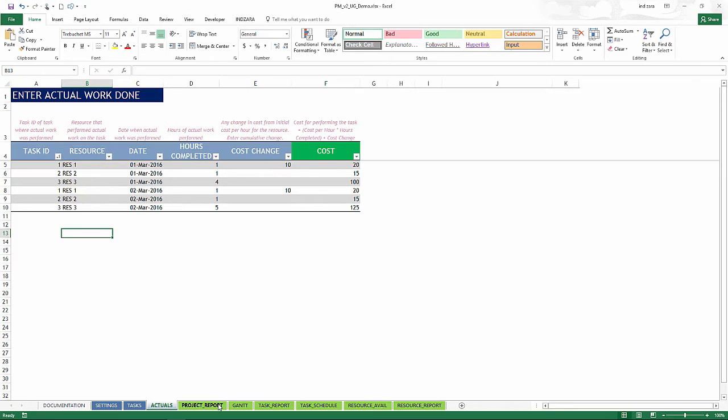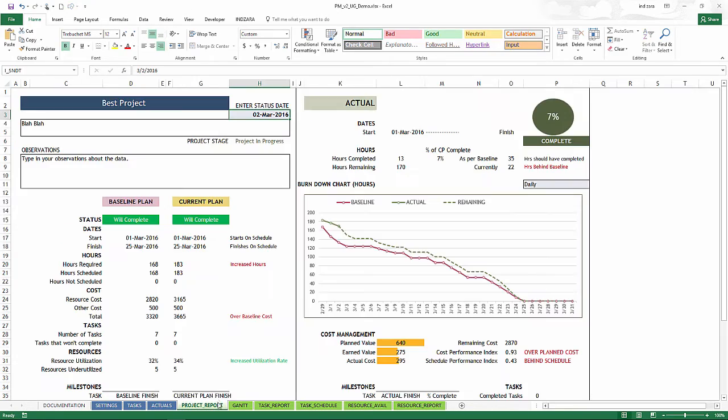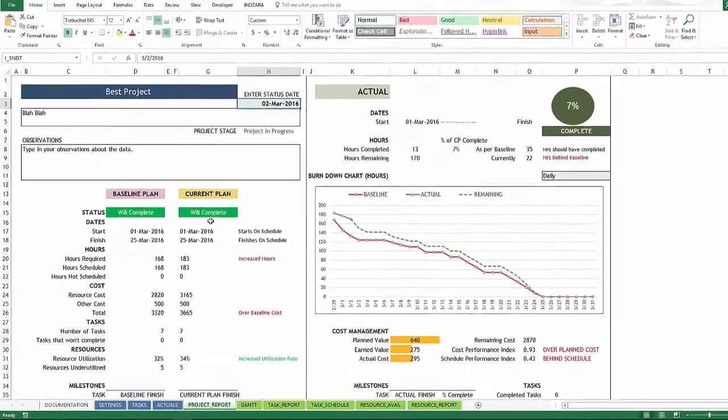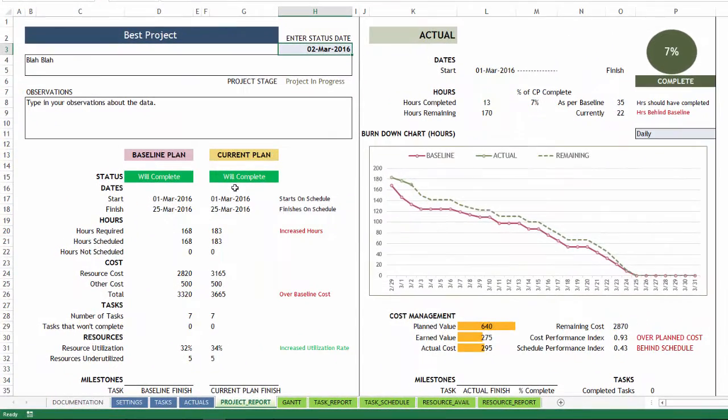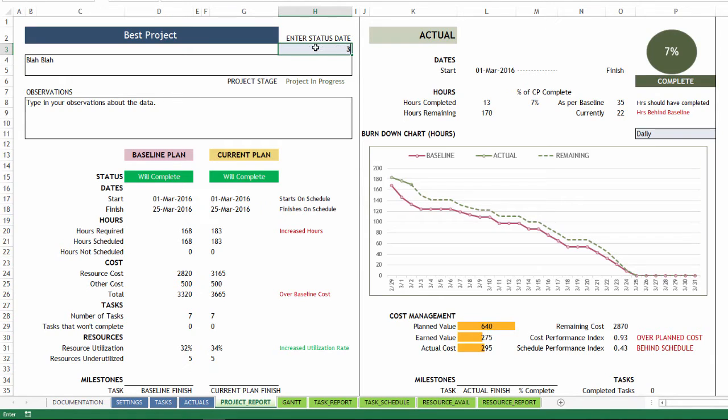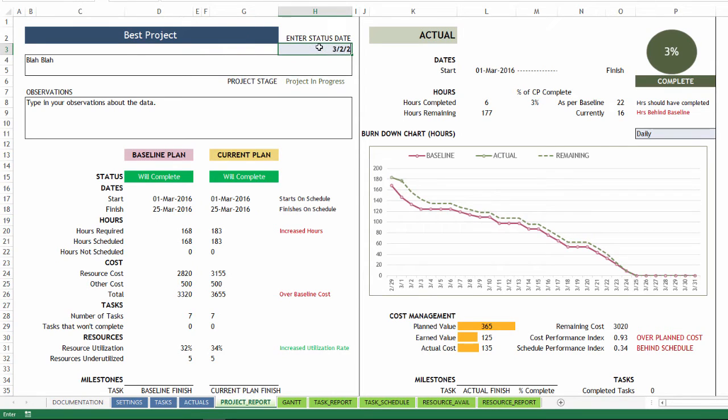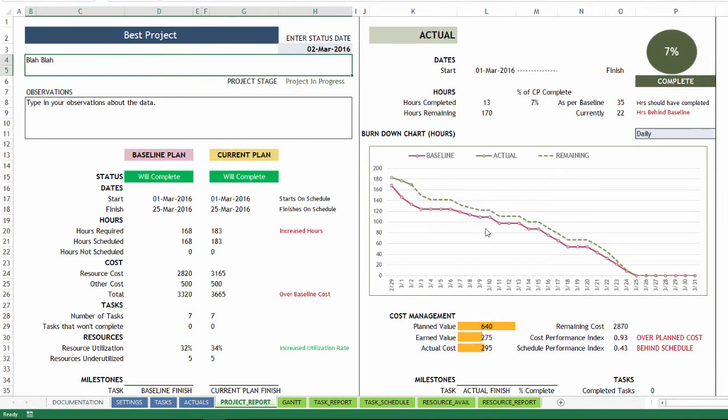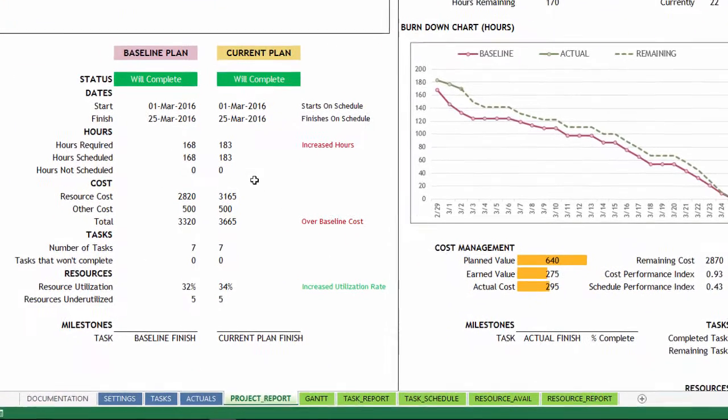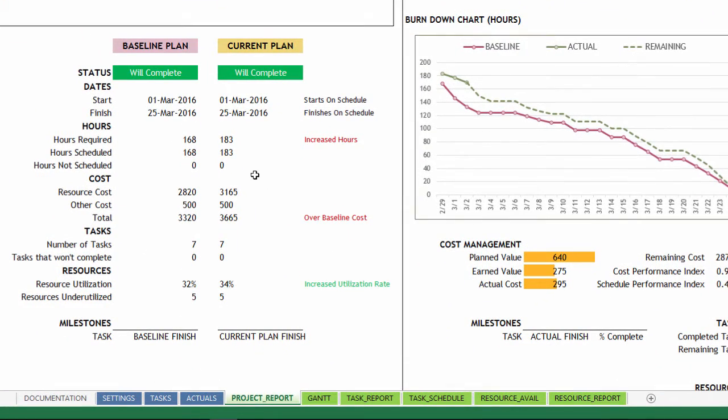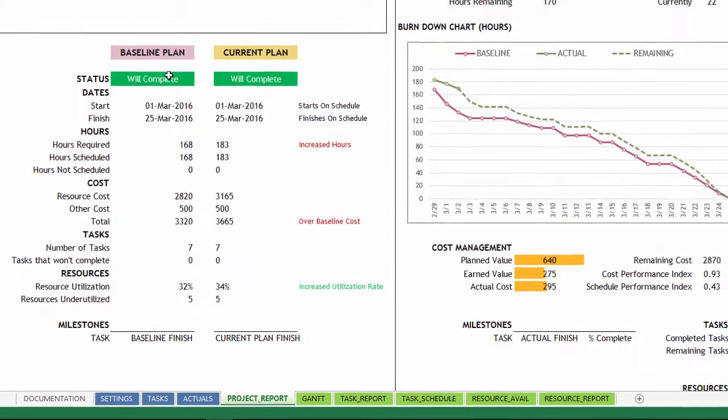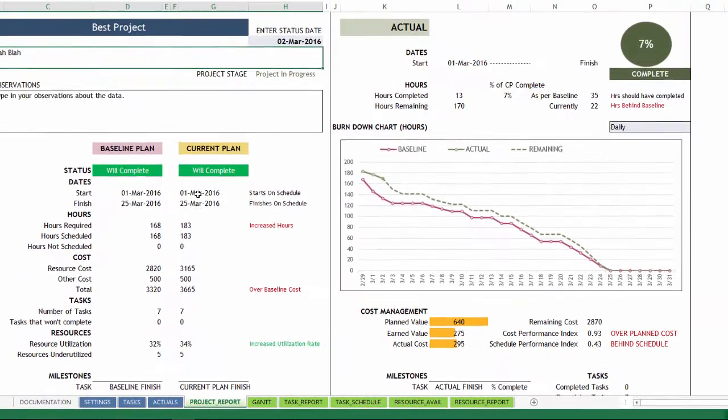So let's go to the first one, project report. Just this is the overview of the project. It provides you a baseline plan and a current plan. And you can type in, OK, I want to see the project status as of March 1st. Then everything gets updated. And if you say March 2nd, you know, it can get updated instantly. So this is where the plans can be viewed from the top and they can be compared against, the current plan can be compared against the baseline plan.